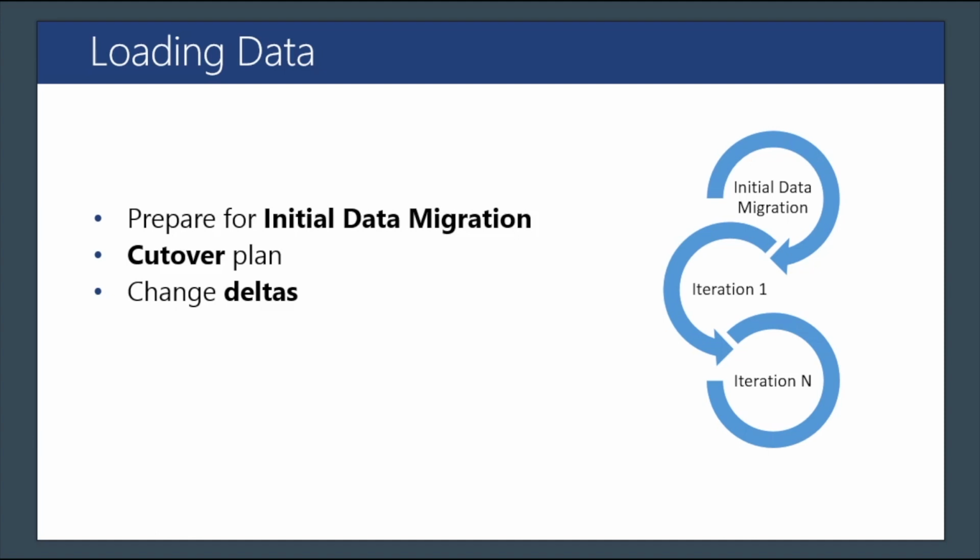But naturally, you can do that over and over again. Some customers run this in different ways, and they prefer to migrate data in different bulks, in pieces, until they actually have that last iteration, which will be done in the last weekend, the go-live weekend or migration weekend, where everybody's going to switch from the old system on Friday evening to Dynamics 365 online as the new system in place on Monday morning.